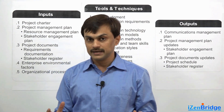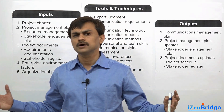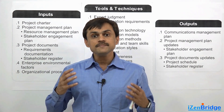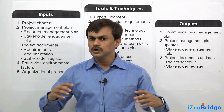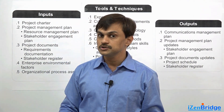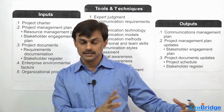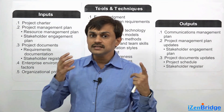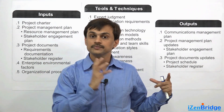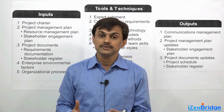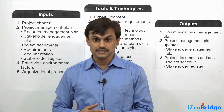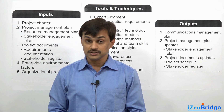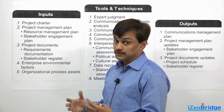You might be working in an organization where things are very informal, or conversely where things are very structured and formal. Your communication management plan changes its rigor accordingly. In a very formal, structured organization, you need to produce well-defined reports at defined frequencies. In an informal organization, a lot of communication happens through meetings, so rather than pushing information through documents or reports, you may have status review meetings happening at a given frequency, with some informal and some formal meetings. Enterprise environmental factors influence you a lot.